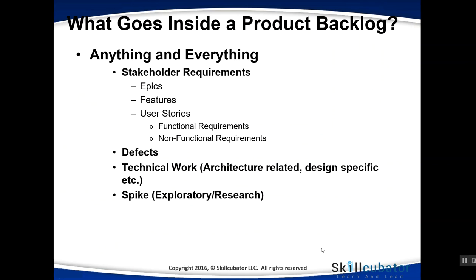A product backlog contains anything and everything that needs to be done towards the completion of the project. Any work that needs to be accomplished as part of the project must go into the product backlog. That includes stakeholder requirements — broken down into smaller components: epics, features, and user stories. User stories can be functional requirements or non-functional requirements (NFRs). That is the main component of any product backlog.